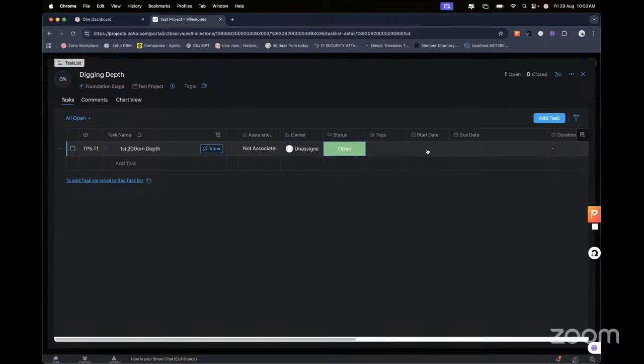Then you pick the start date. This is supposed to be the first week of September, so it's supposed to start 1st of September. To make it easier for you, you can just pick the number of days. Let's say this is supposed to take 3 days.